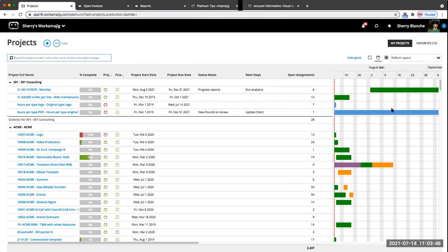If you have task constraints that are rigid, this must happen on or before, or no later or sooner than, and the actual dates are different than that, that will turn it red. So lots of things can indicate a schedule being red, yellow, or green. And we can help look at those more specifically for you if you want to send an example.